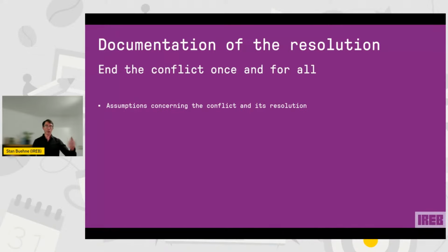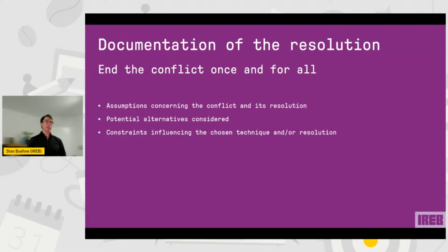This means all assumptions you have created for this conflict and for resolving this conflict should be documented. The potential alternatives that you have considered for this conflict should be documented. You also should document the constraints that were given to resolve this solution, and also the technique that has been used.